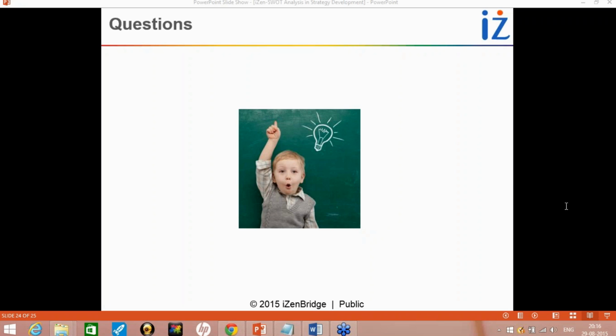The next question is, I would like to know more about project charter. Okay. Charter is a document which provides a signal of project initiation, a signal for the project to start. It provides authority to the project manager that you can use resources of the organization. It integrates all the areas of project management. It includes the high level requirements of the project and product, and high level estimates of cost and schedule. You identify the high level risk. So it provides a direction to the project execution, and project goals and objectives are included in the project charter, and these goals and objectives are in line with the organization goals and objectives.